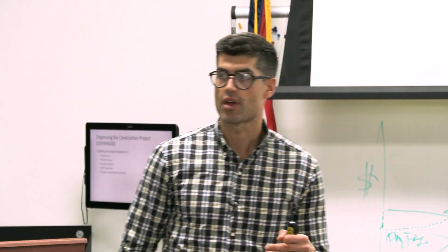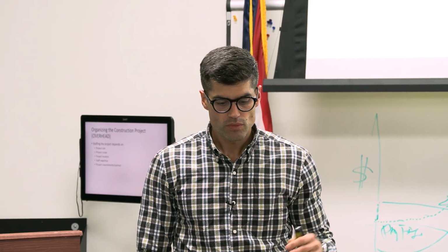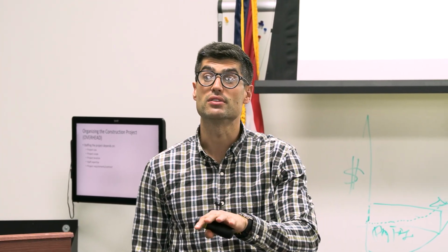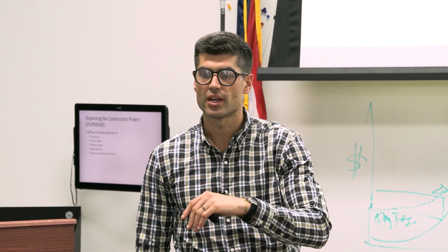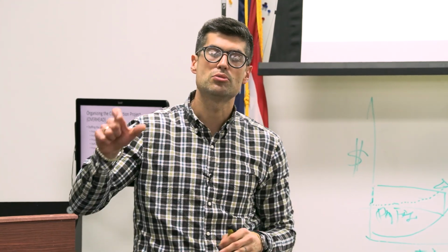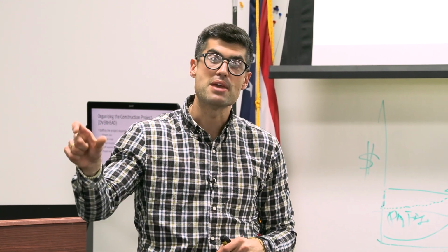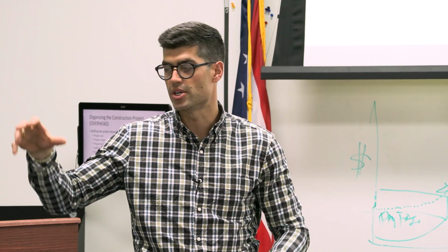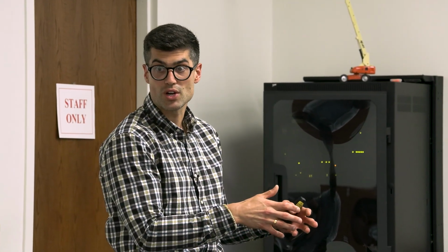Next is our expertise. How you guys, from an estimating standpoint, align the expertise should be as follows. Okay? I'll give you guys a great example, the Kent State CAED, which is a cast-in-place post-tension building. I could have someone who's coming off a parking deck in Cleveland. Completely different buildings. One's a higher education building, one's a parking deck. I want to align the critical path activities of that project with the next project, right? So maybe that project manager, the superintendent, or the field foreman who just built a parking deck would actually be perfect for the Kent State CAED because the biggest critical path of that building is the concrete. Very similar to the structure they just came off of.